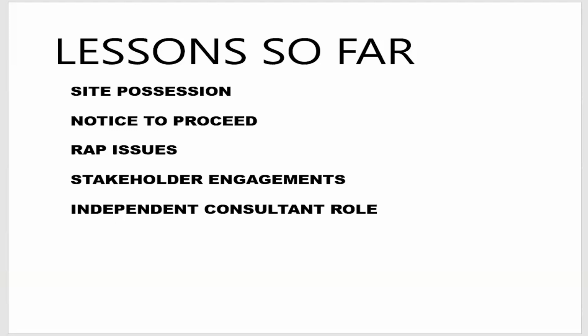So the contractor was given site possession last year, but the notice to proceed is tied down to the design acceptance by the client, which is GHA and MRH.